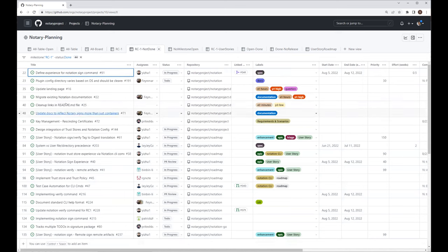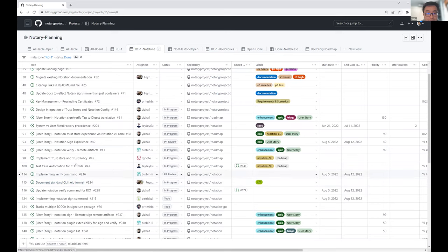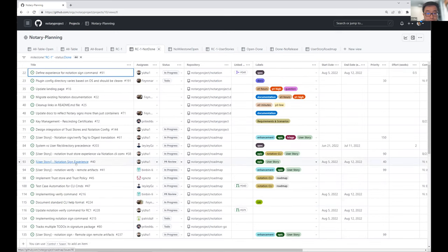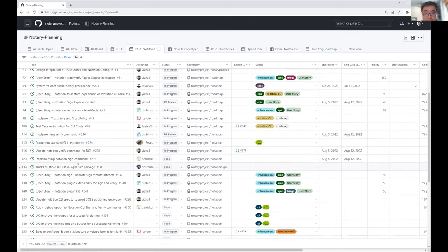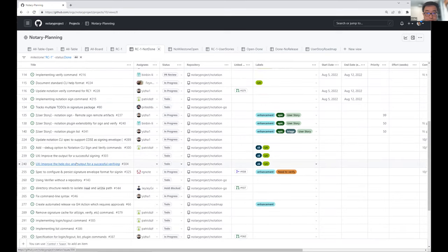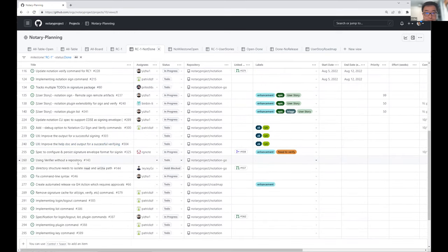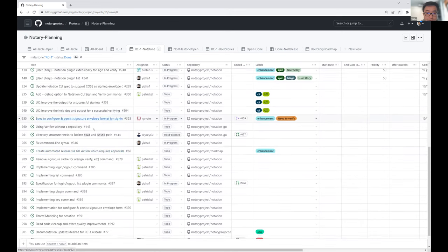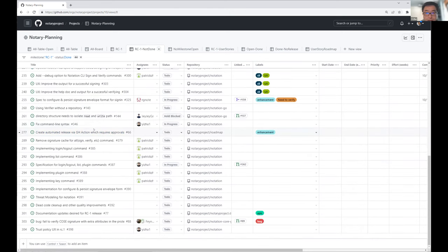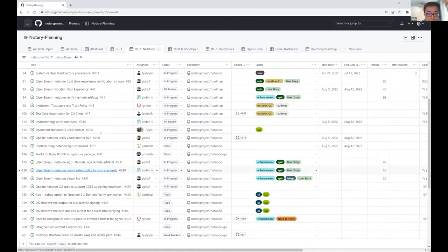I would suggest this because a story is from the high level, and the issues, because everyone can create an issue, this list will get flushed out. But if we have the key user stories anchored in that board, then we will know what we are going to achieve, and we can make this cost estimation against these user stories.